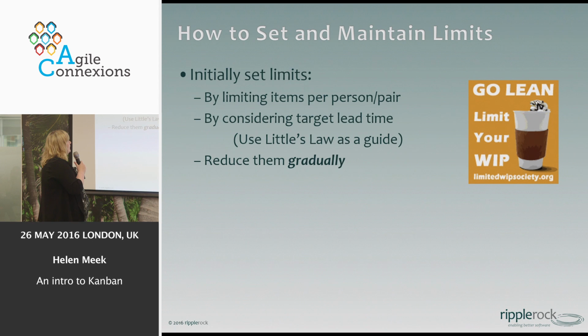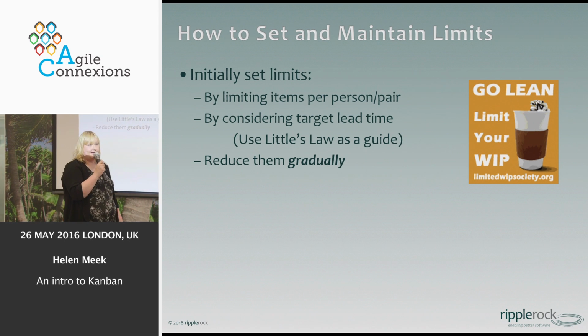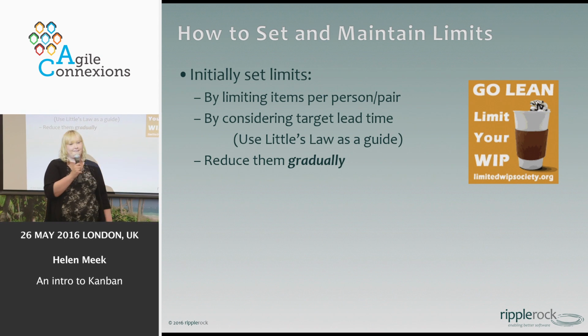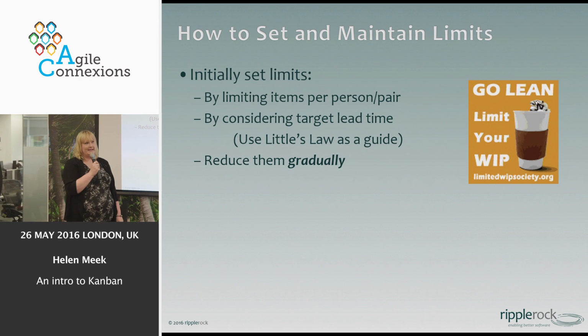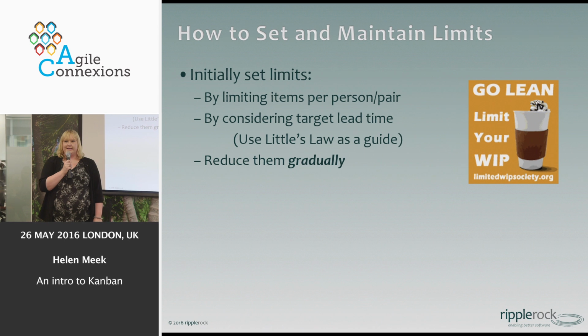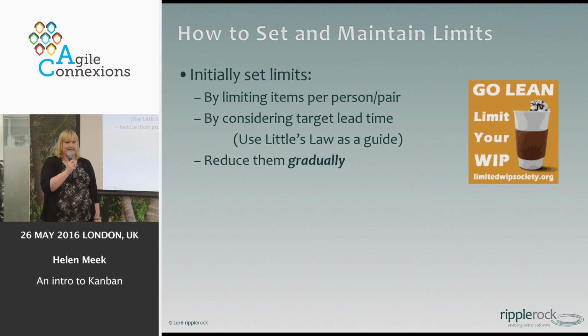Alternatively, when setting your WIP limits, you can just have a guess. If you haven't got that information, which many teams haven't, you can have a guess at this. So do you remember I said my WIP is probably 2 pieces? So give me 2 pieces of work as my WIP limit. If you've got 10 people in the team, you give them 2. That's a WIP of 20 that you've got to spread throughout the board wherever they have to do some work.